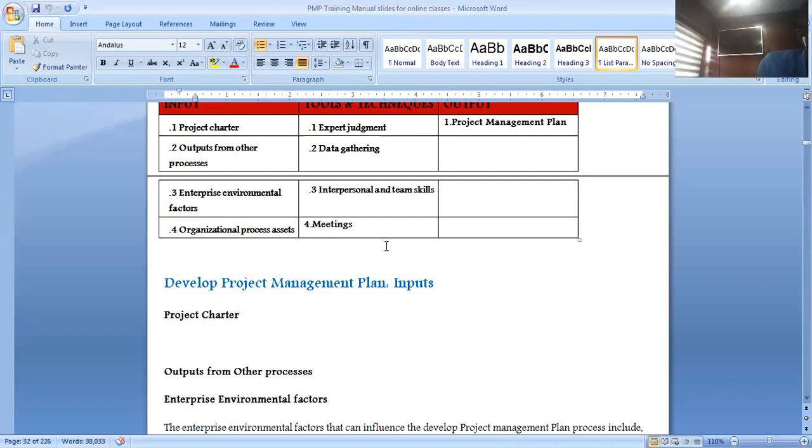Now, in the project management plan, you have all the works. You are carrying out your alternative analysis in this place. People are coming up with the work plan. And now remember, the work plan has its subsidiaries. The cost management plan would have to be there. The risk management plan is in the project management plan. The schedule management plan is in it. Everything you take, all the subsidiary plans, how to deal with the stakeholders, the plan is in the project management plan.